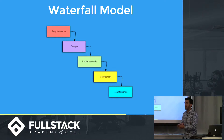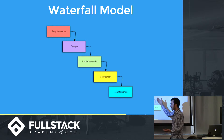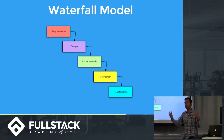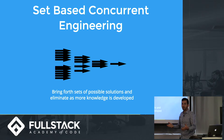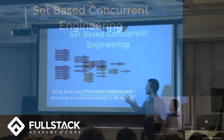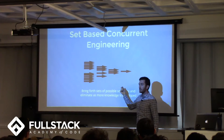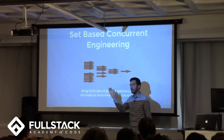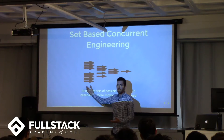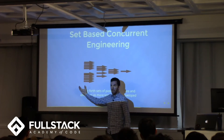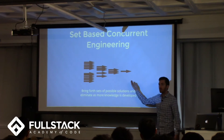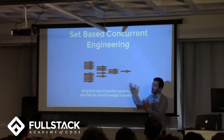In talking about a development model, we can't not address the waterfall model. If any of you have had a project management course, this is how we introduce the topic: once you define the requirements and start cascading down the waterfall, you're not allowed to go back up — get all your requirements first, then move on. But of course it doesn't work like that; we have to go back and rework because we don't know all the requirements at the start. A lean model introduces what we call set-based concurrent engineering. The idea is to bring forth sets of solutions through each design iteration and really develop those solutions. We end up spending more money maintaining multiple sets, but early in the project, changes are cheap — at the end, when more is defined, changes are incredibly expensive. So we bring forth sets and refine them as we go.